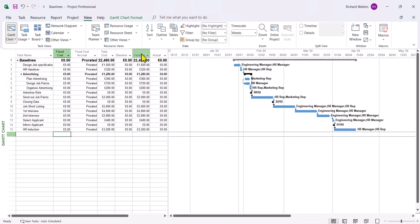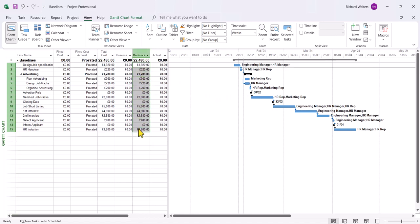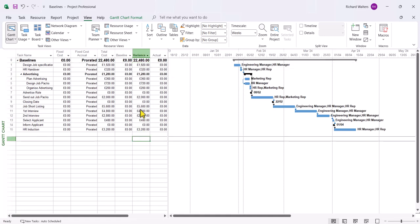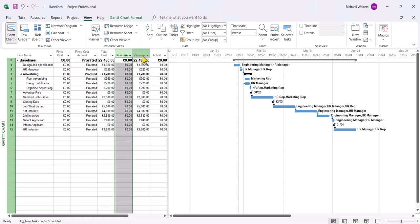Cost. Now at the moment, the reason why we got a variance is because this variance would have been zero before any of the resources were allocated because these resources have got costs against them. So what's happened here, the variance column in effect is almost like your budget. It's like a planning budget whereby you can now see the costs from a zero cost starting point where this would have been zero first of all because there wouldn't be any resources assigned. The minute we start assigning resources, we can then see how the cost builds up and then you can see how you're going against your budget. So when the budget is correct and you think, yeah, that's correct, you can then set the baseline and say, yes, everything's fine. And what will happen, this variance column will clear itself and it will, in effect, move itself to the baselines. Whatever's in this variance will straight away move to the baseline the minute the baseline has been set. And then any cost then that's extra will be a variance from that point forward.